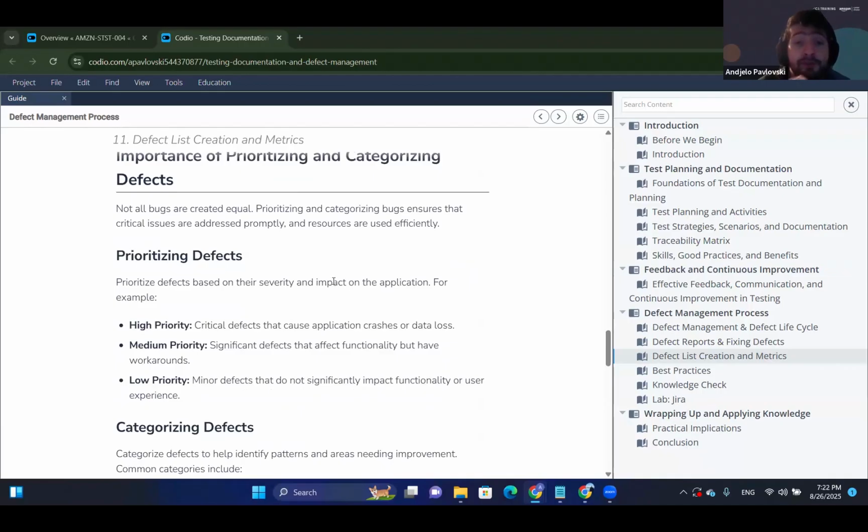So one of the fields that we had here was the priority, severity. You usually have this again in the project management tools. It's very important when managing defects to make sure that they have the right priority. You can have high, medium, low. In some management studios, you could actually enumerate them. Again, this is all different approaches. And it's very important because you want to make sure that the ones that have the highest impact and priority are the ones tackled first.